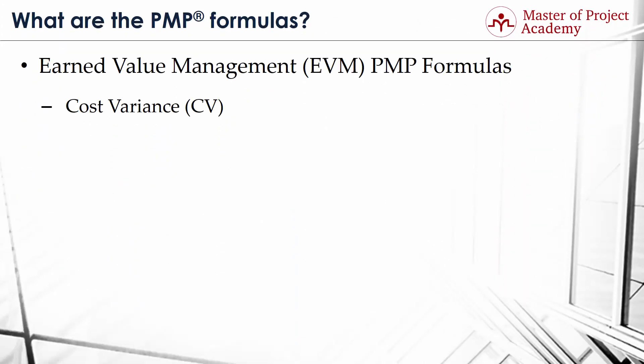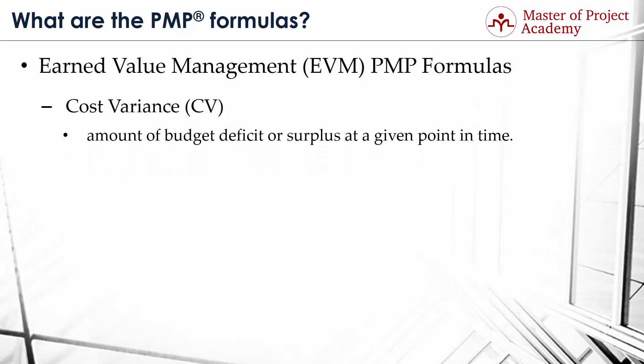PMP formula number 3: Cost Variance or CV. Cost Variance represents the amount of budget deficit or surplus at a given point in time. Basically, we express it as the difference between earned value and the actual cost. Accordingly, its formula is: CV equals EV minus AC.